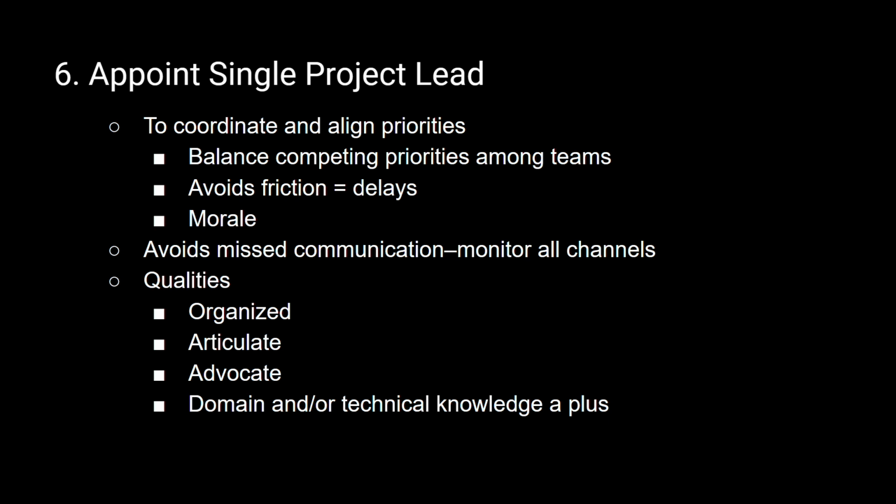And I think most of all, you need to think of this as an investment in the success of the project. I would recommend not choosing someone who is an everyday user. The problem with that is they're going to have all of their regular day-to-day responsibilities, and then you're going to add in, oh, by the way, you need to lead this gigantic project as well. That's not going to go well. So I would recommend bringing someone in either from the outside or someone who is a special project lead for this particular project that doesn't have responsibilities outside of just managing this project.